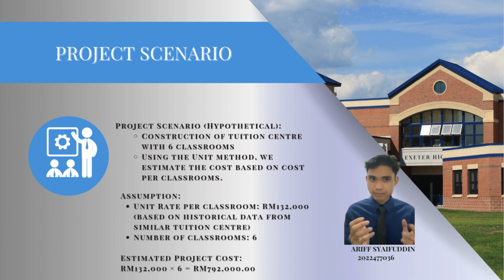The assumption: unit rate per classroom is RM132,000. It is based on historical data from a similar tuition center, and the number of classrooms is 6. So, the formula of the unit method is unit rate per classroom times the number of classrooms.